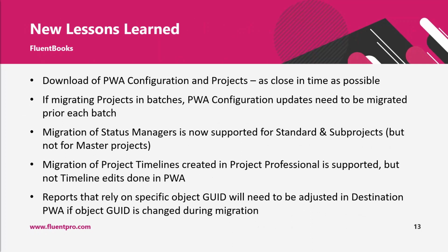So there are several new lessons learned that we carried out of migrations that were done last year, and one of them is it is important to perform download of PWA configuration that includes resources and projects as close in time as possible.